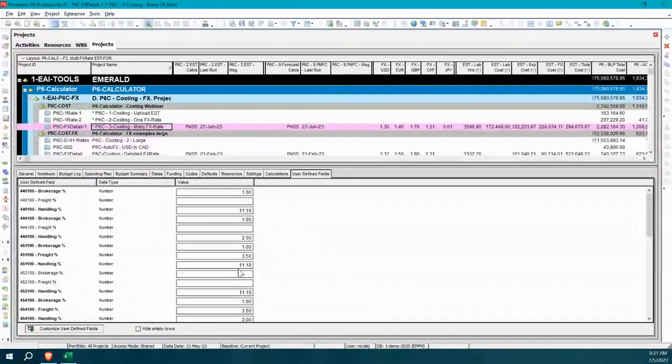Now we have other clients that had a similar type of need, but it was on a resource. So when they received a crew, their estimates were done by crew. This type of crew was going to need 20 hours. Well, the problem with working a crew is that it doesn't necessarily separate out your carpenters, laborers, pipe fitters, etc. So they knew that certain crews had certain complements.